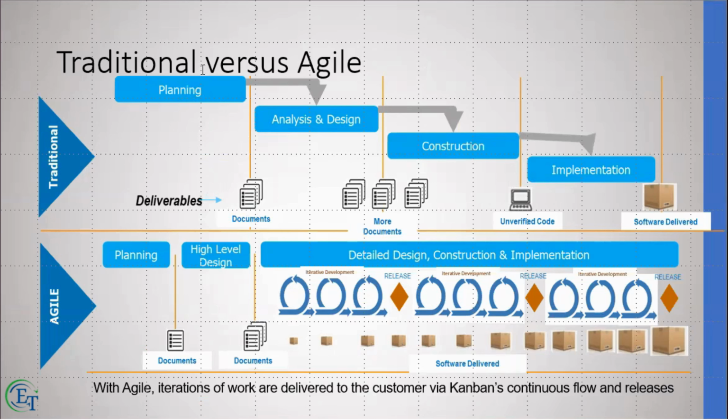From this planning documentation, the product team would analyze and design. So the product and the development team would get together. They would analyze and design. They'd probably do a 200-page BRD or a business requirements document with a 200-page high-level design and further low-level design documentation. And the result of this phase would be more documentation, which would then go through reviews and approvals.